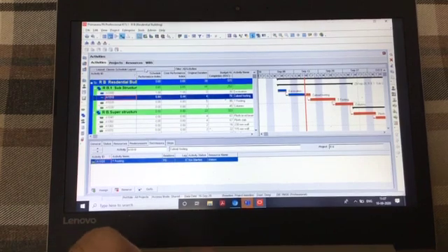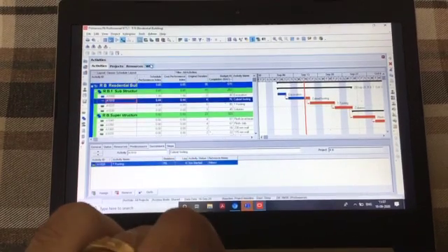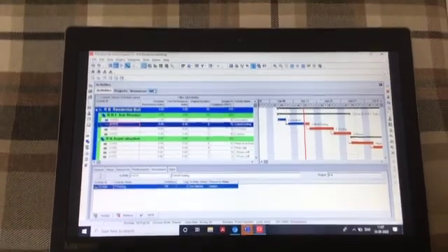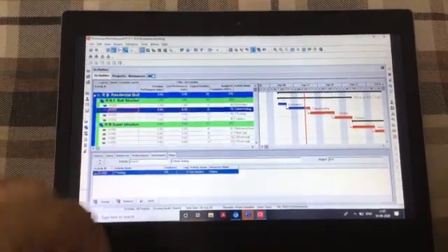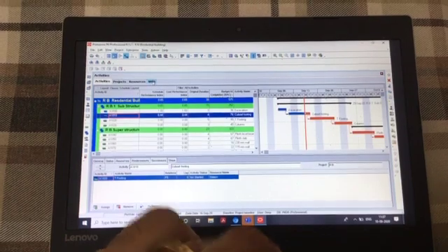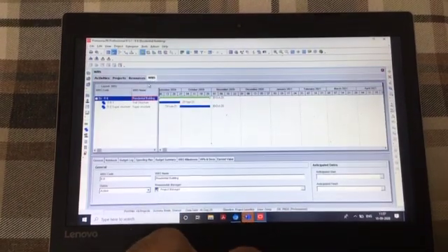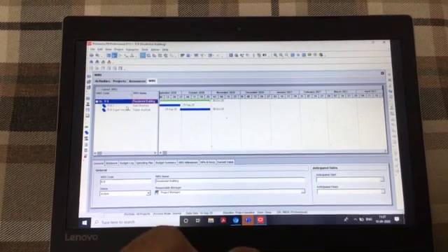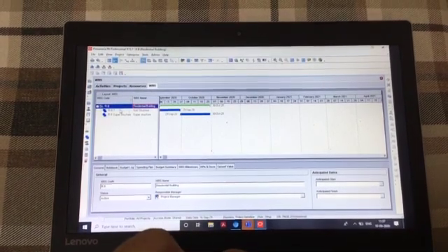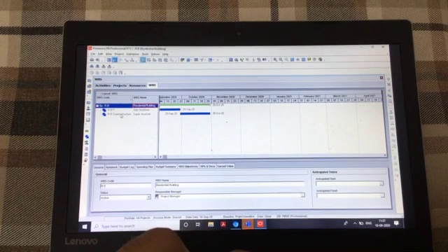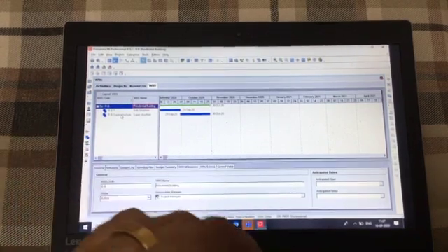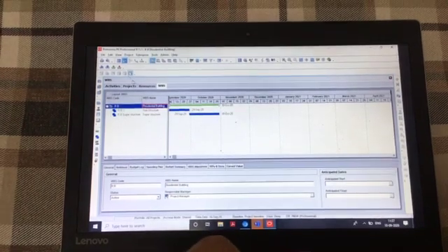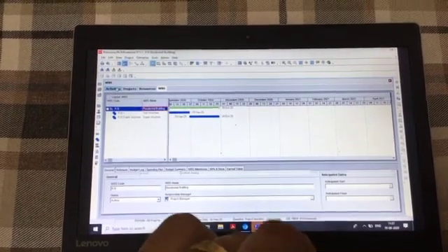Okay, so we'll start from the basic. We have a project at our hand, a building project, in which there are clearly laid out activities, and we have simply broken down the work breakdown structure into two parts. The first part is substructure, and the second part is superstructure. Superstructure is above the ground; substructure is excavation, backfilling, and all, plinth level. Okay, we go to the activities now.